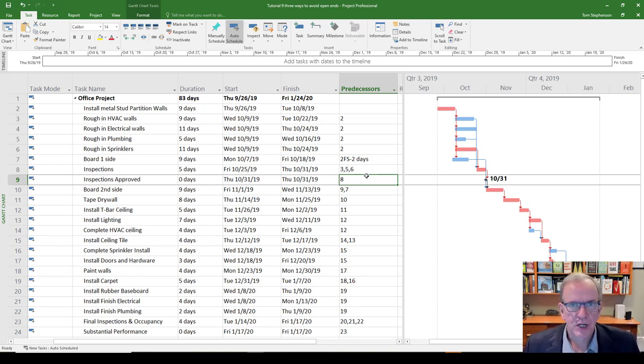In construction projects, it has a huge impact when you have things that are delaying things or taking longer. And when you actually have it connected to the wrong successors, that's another problem altogether. But not having it connected to anything, well, then I might ask you, what should it connect to? And I very often get a response, well, it doesn't really matter. It's not till months away. Well, at some point in your project, that may matter, because you didn't connect it to something and you actually didn't do the work. And now all of a sudden when you do connect it, it pushes the whole project out and it's delaying the project.